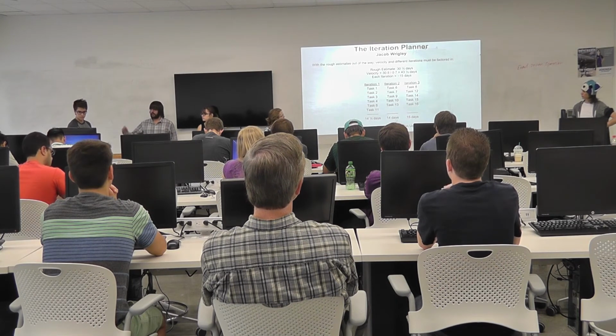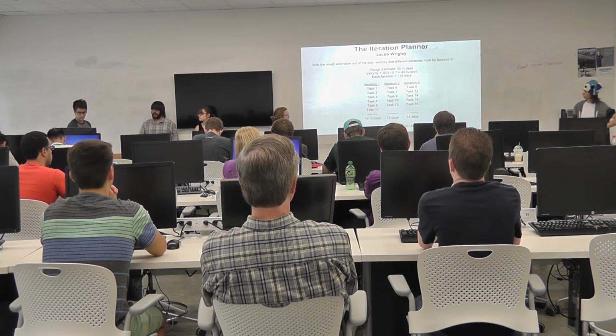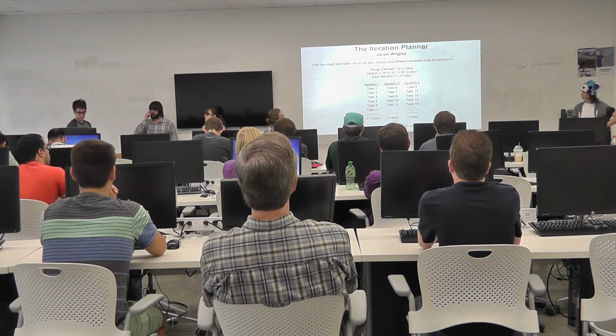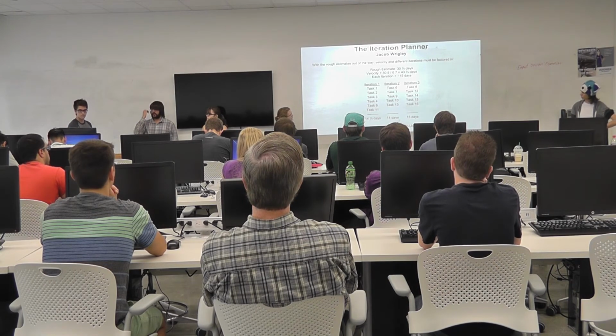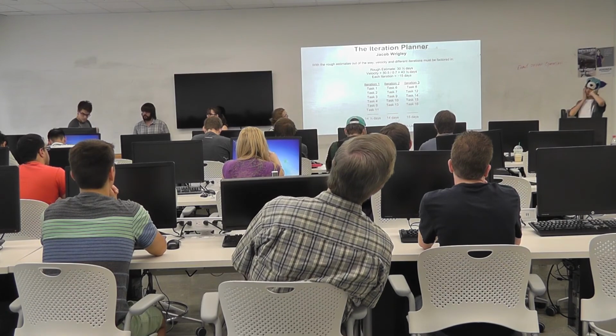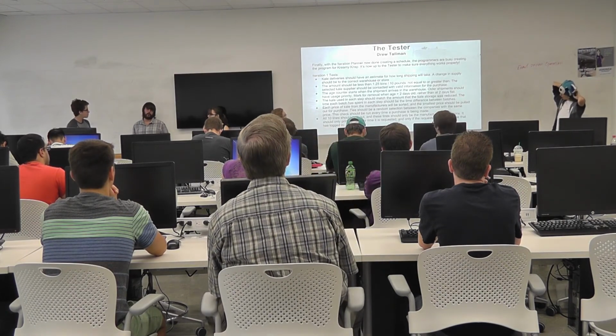So with this in mind, I added it up, and I got a rough estimate of about 30.5 days, about a month. With velocity, that's 43.5 days. So we decided to split each iteration up into 15 days, 3 iterations. And of course it's based on user priority.